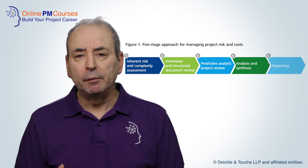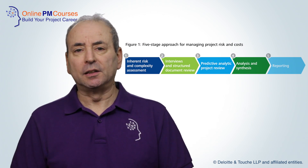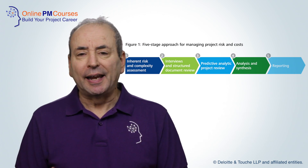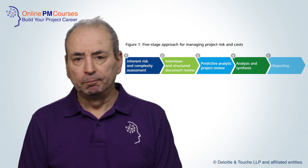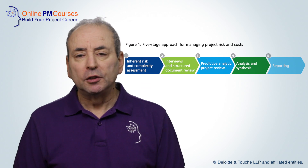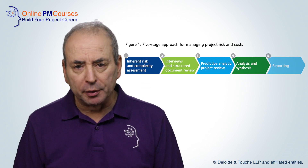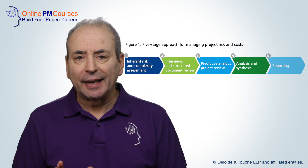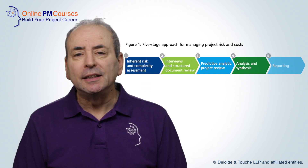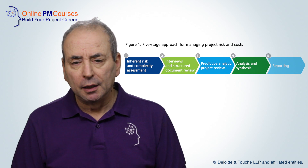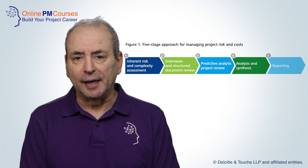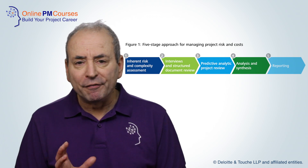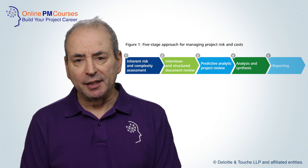At step three, we feed all of this information into the software and use predictive analytics to carry out a risk review. At step four, Deloitte analyzes the output from the predictive analytics tool and uses that information to identify potential improvements to the risk controls on the project. And at step five, they report on their findings and make their recommendations.